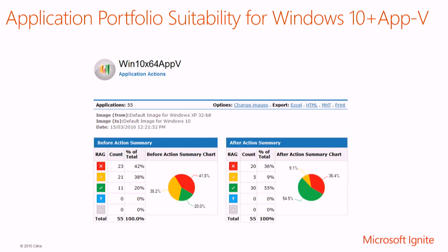From a project manager's view, you can start going, well, if most of these apps, or 60%, are going to work, I can send them to UAT, and maybe 5% of those will need some work, and it's going to take me this much time. And those ones that are amber, I can send to my packaging team. Normally they take 5 days or 10 days or 3 days, depending on their skill set, to fix these sort of things, so I can figure that out.